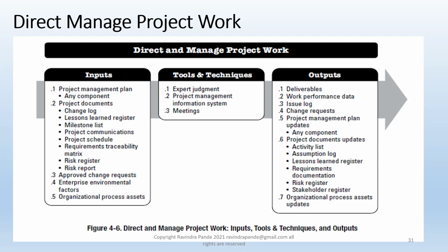Then of course we have the RTM, requirement traceability matrix, so that we have all these requirements listed there. Then these requirements are assigned with when we started the discussion, when that requirement got initiated, in which meeting, who approved, who sanctioned, and then how we are going to convert these requirements to the feature list, product features and all those things. So this RTM is a kind of reference table, specifically an Excel sheet, but there could be a Word document as well.